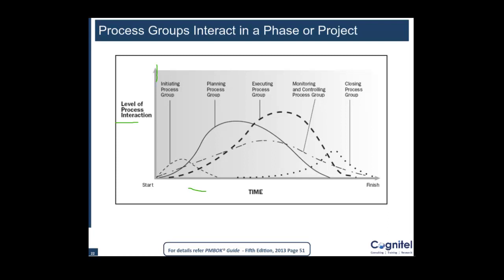At the start of the project, the most interactive process group is Initiation, because that's the process group you take up when the project starts. Of course, some planning also starts, and some monitoring and controlling also starts at the same time. Once the project moves on and you've done some planning, you might start some execution like hiring certain people or bringing people onto the team. Those kinds of execution work can start early, but the highest level of interaction still remains with Initiation.